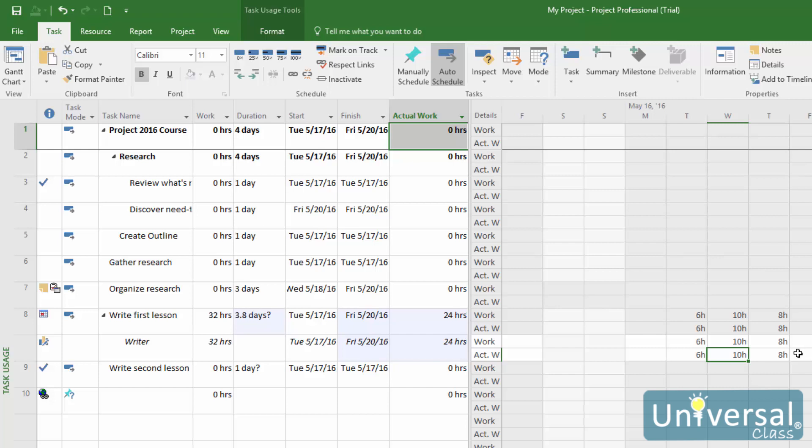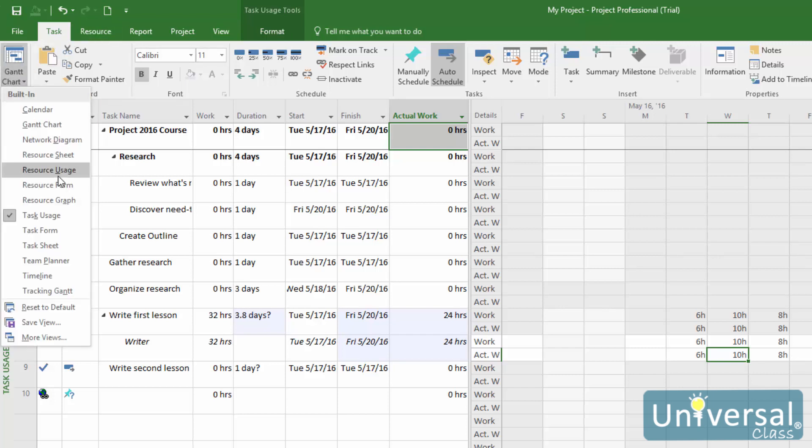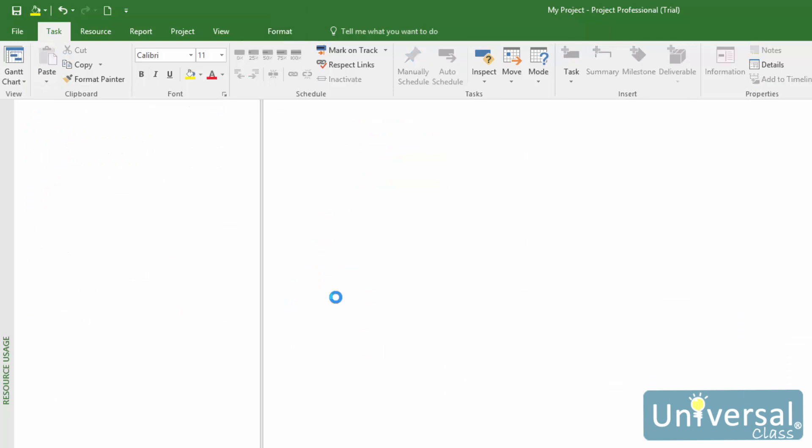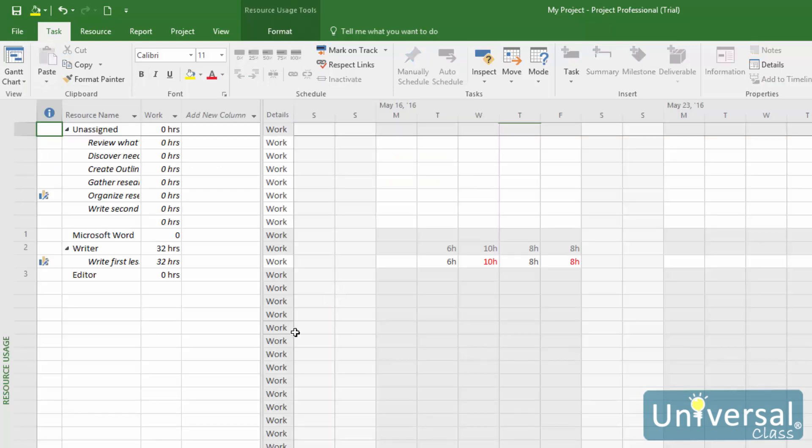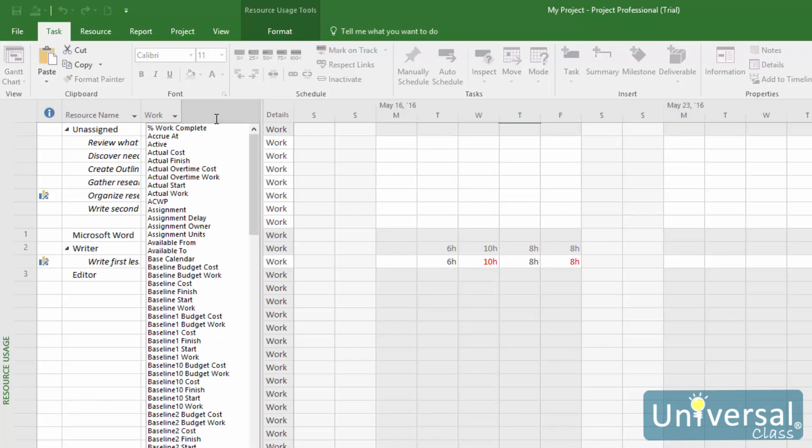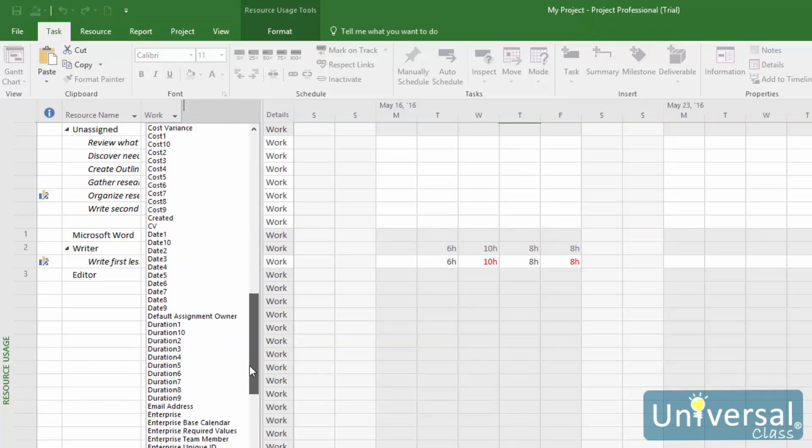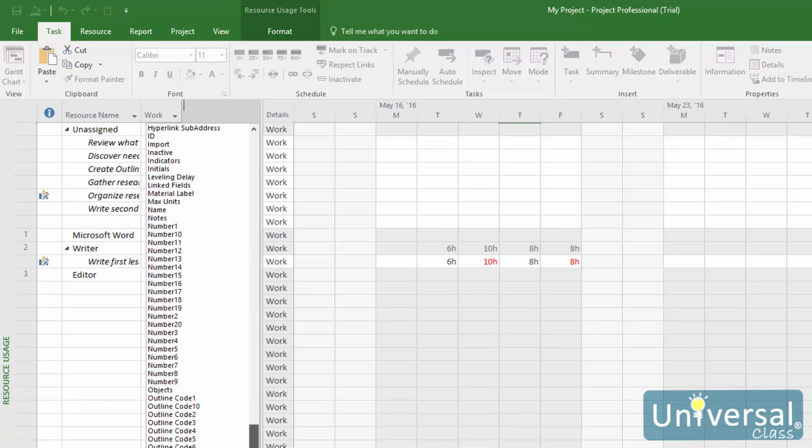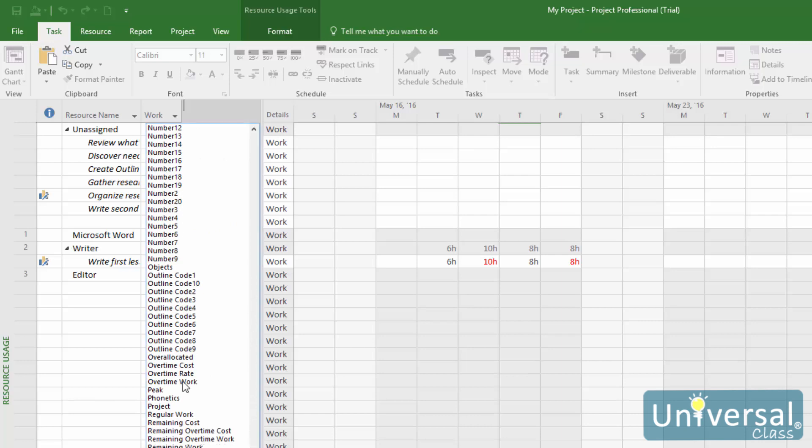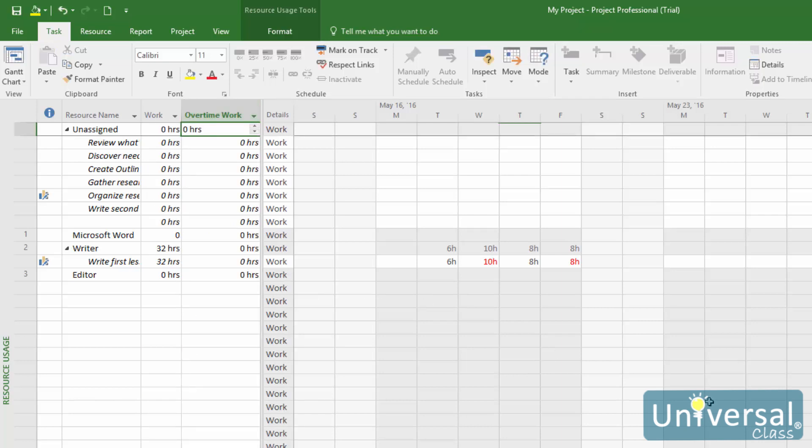To enter overtime for a resource, go to the Resource Usage view by going to the Task tab, then select Resource Usage from the dropdown menu. Insert a new column as we've already learned to do. Select Overtime Work from the list for the type of new column—it's in alphabetical order, so it should be down the bottom somewhere. Next, click in the column for an assignment for the resource, then click the up or down arrows to specify the overtime hours worked.